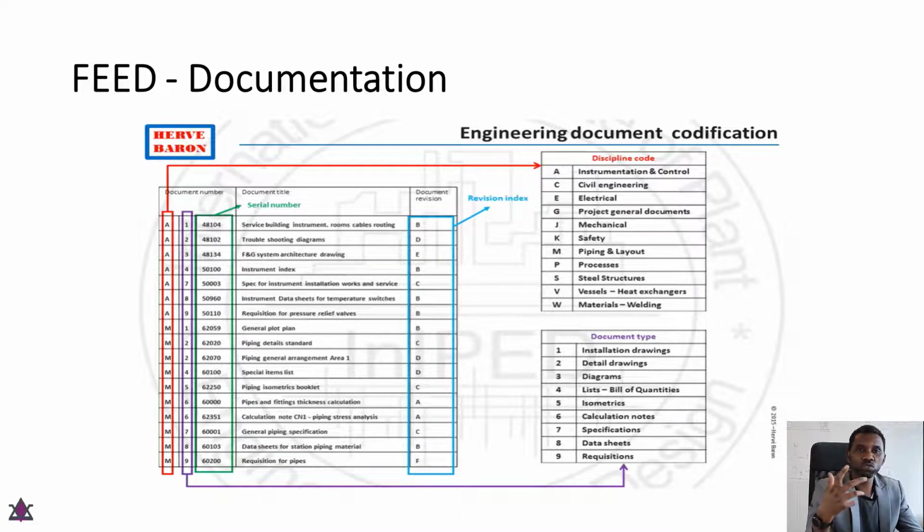So you always need to indicate that it has been revised on this particular date and it is indicated on the document. This is helpful because when a person wants to make comments or have a meeting, you want to be sure that everybody has the latest version of the same documents. So you don't go ahead and end up reinventing the wheel or having conflict in discussion because people are having different documents in their possession.